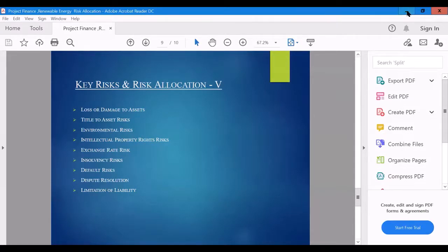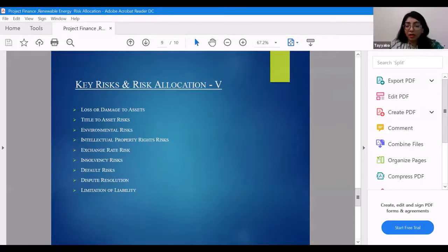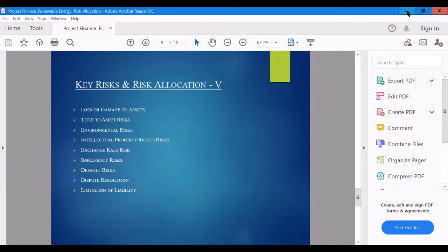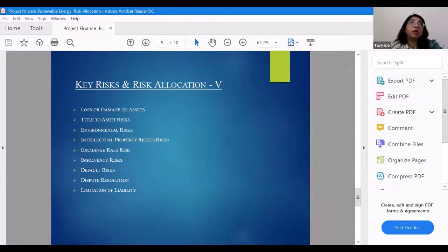Okay, just give me a second. What percentage of the project cost goes into payment of insurance? That's what you asked. Yeah, and managing the risk. Managing the risk is actually inbuilt into all the things that you're doing. So if I put it that way, insurance is roughly 1% of the project cost, 1 to 1.5% at most.